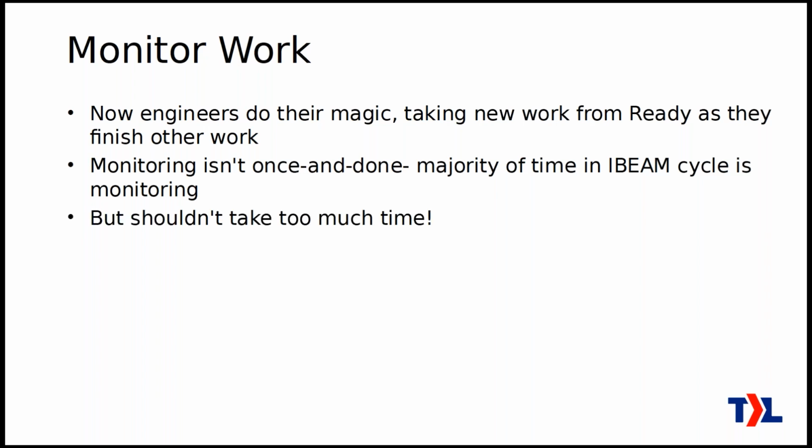Shouldn't take too much time though. Certainly we don't want this to be a burden, and we don't actually need to consider all of the tickets as they get done. What we are going to do here is monitor by exception and look for those tickets that aren't moving through the pipelines as fast as they should. So we're going to manage by exception.